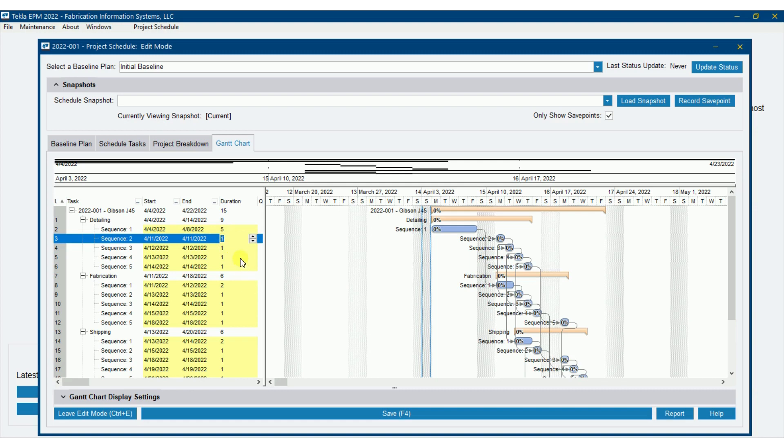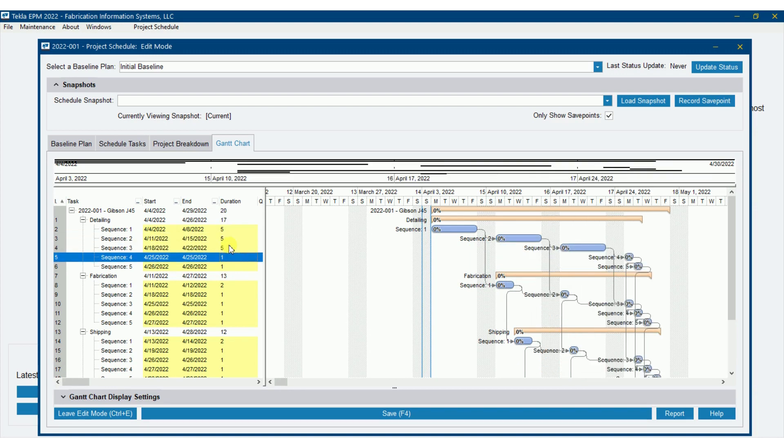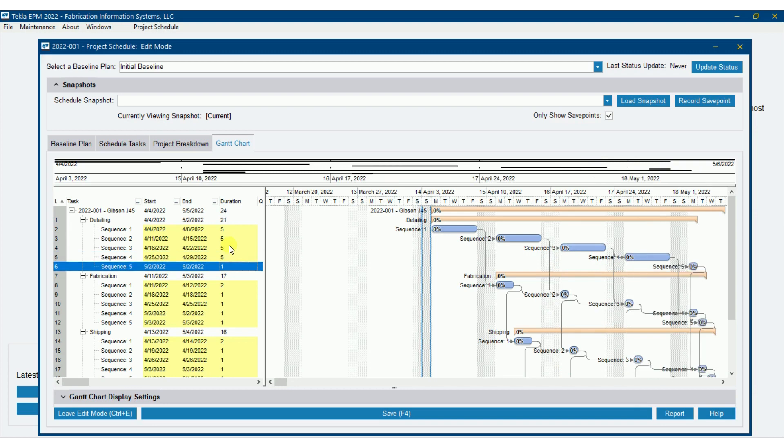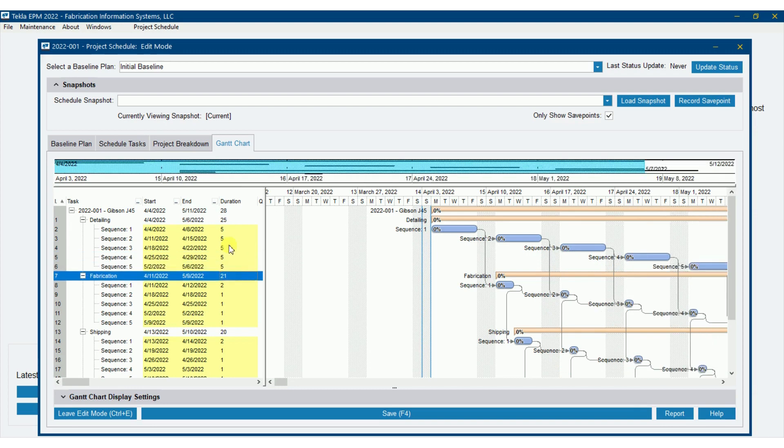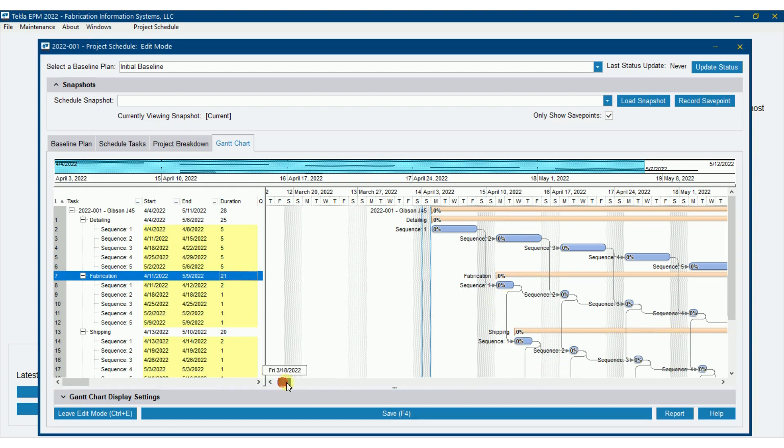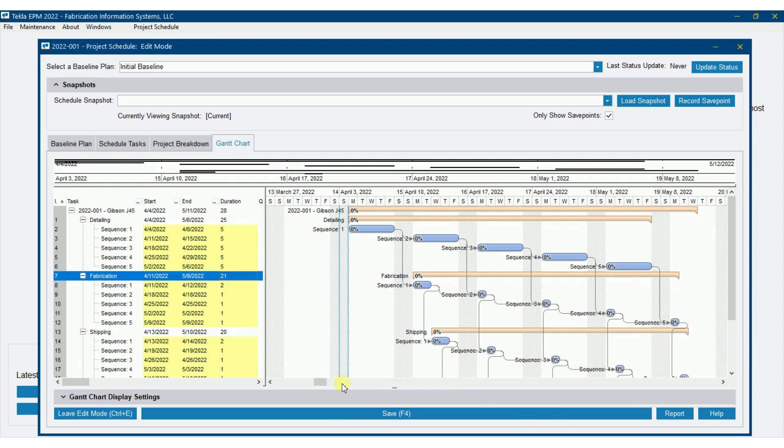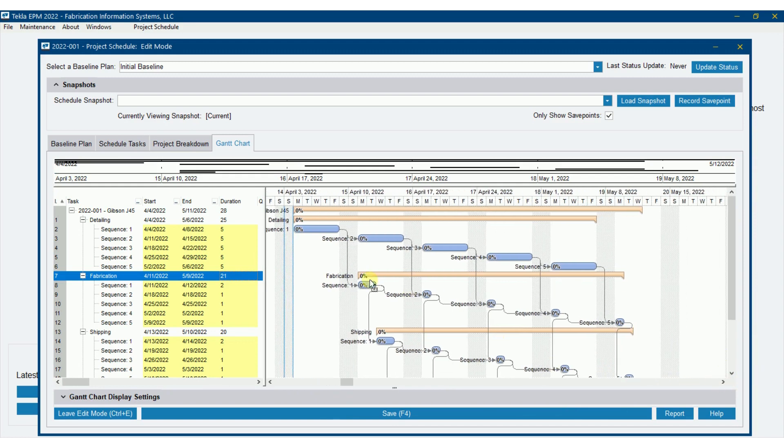And now this duration is only working days, not calendar days. It's working days. So I'm going to say all of these are five. So I've given myself a week for each of those sequences. Notice that because of the links, everything is filling in and pushing out based off of the links that we've already put in place in our previous videos.